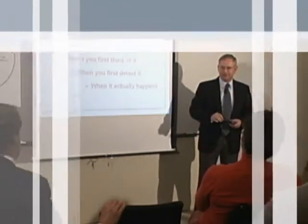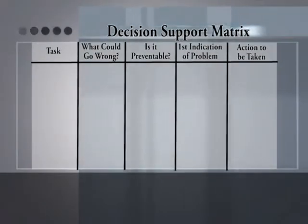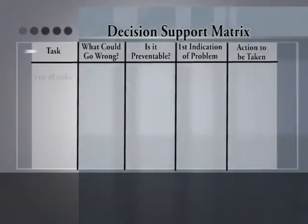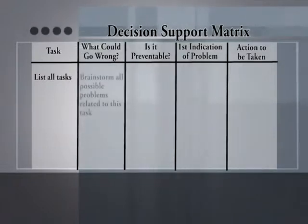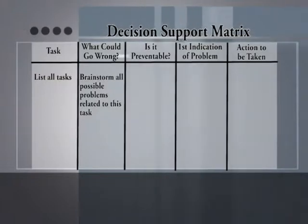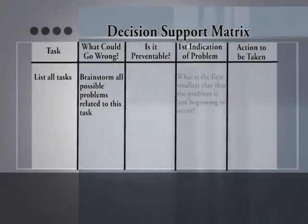That's what I'm going to show you right now. We're going to look at a tool I call the Decision Support Matrix. In the left-hand column, we list all of the tasks in our project — every single one of them. Then for each of those tasks, we brainstorm all the possible problems we could have — what could go wrong.